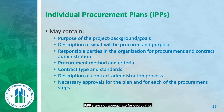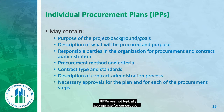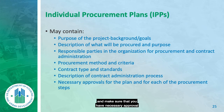An RFP allows evaluation of factors other than just cost, but RFPs are not appropriate for everything. They're not typically appropriate for construction — as stated in section 7.2.B of the handbook — and we'll go over that in Chapter 7. The IPP also helps you define the contract administration process and ensure necessary approvals at each step.